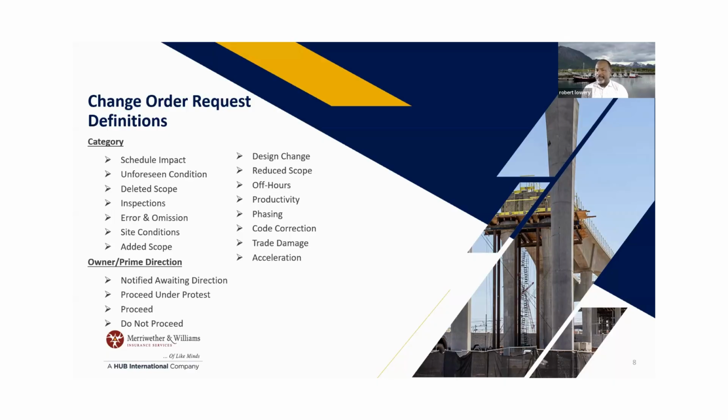But if you have someone working for you as a sub, as a second tier, you're going to get 5%, and the person that's performing the work gets 10%. You're going to have to know exactly how they want that 15%. You can't just go, I'm going to mark it up 25, 30%. They're like, nope, that's not going to happen.